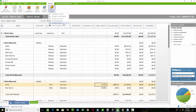The profitability report shows how much did we spend versus how much did we make — it's a great tool for figuring out if your estimated costs are covered based on how much you charged your customer. It goes through the entire estimate and says we projected to spend this much, we collected this much for that specific item — did it cover our cost? If it didn't, then the next estimate needs to have that cost bumped up a little bit to cover it.